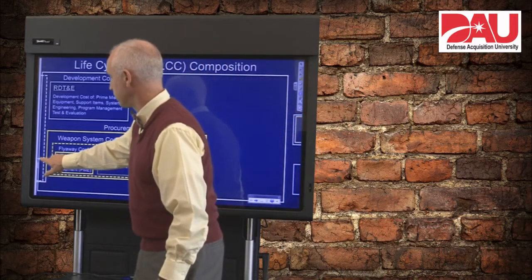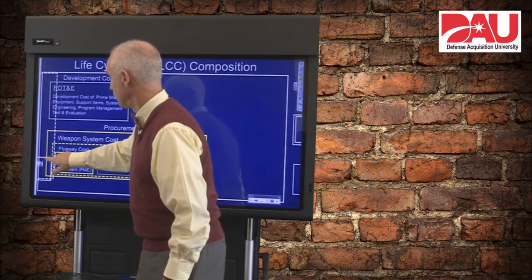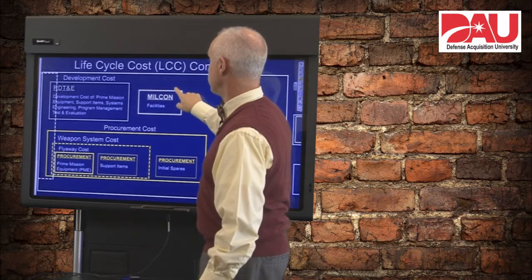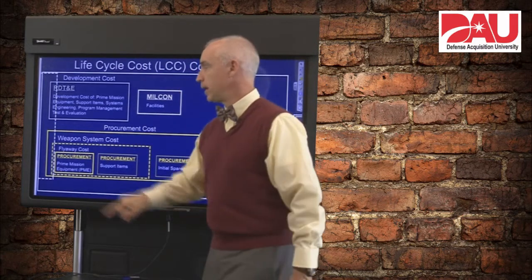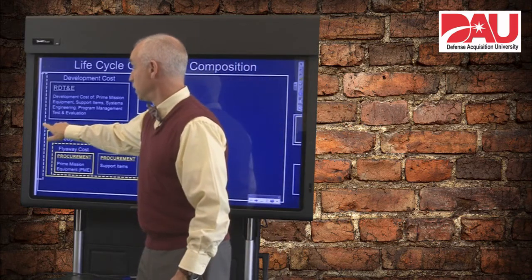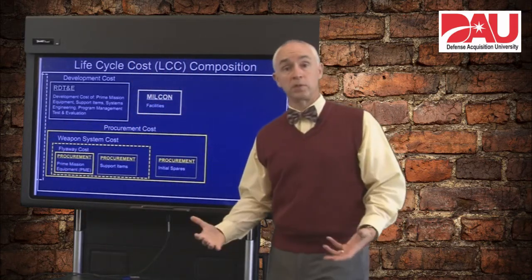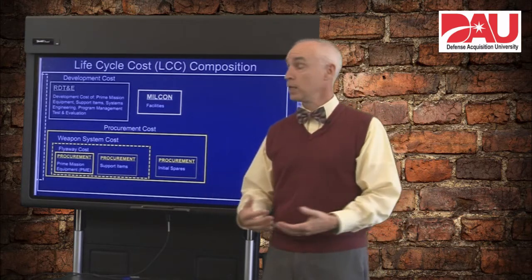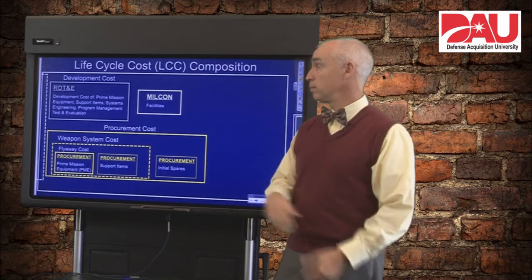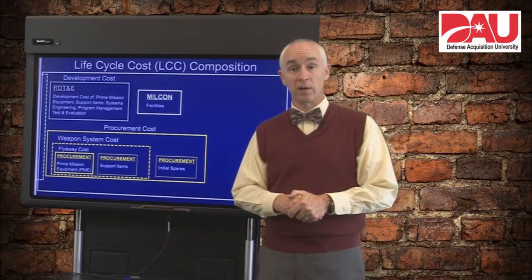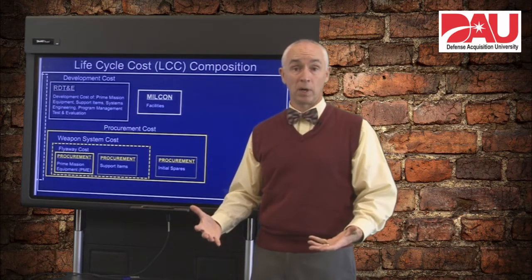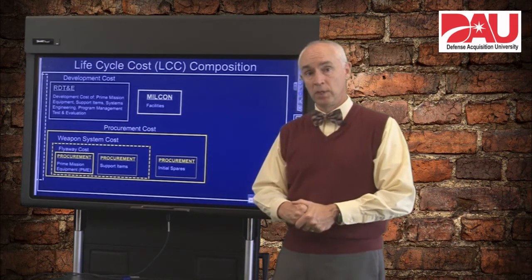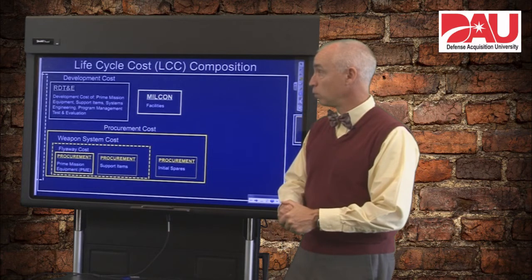Another cost that we have to think about is construction. Do you have to construct any type of facility in order to support the system? It could be hangars, it could be maintenance bays, things like that. If you do, then the appropriate type of money is military construction, or MILCON — that's the appropriation you would use for any major construction you have to do as part of buying your overall system.